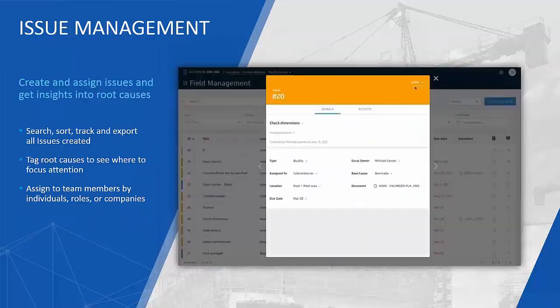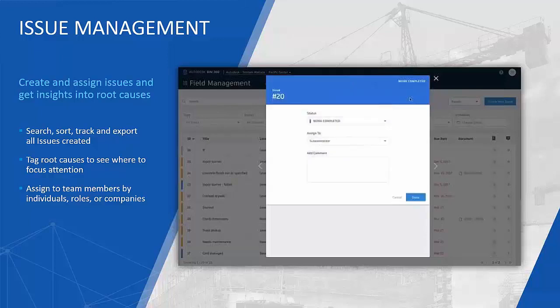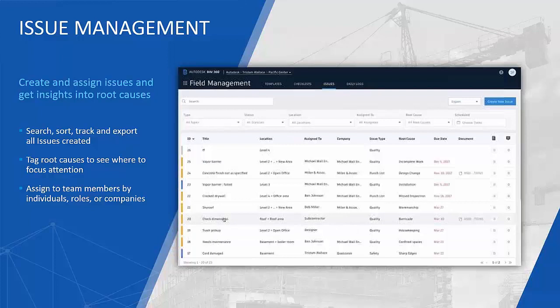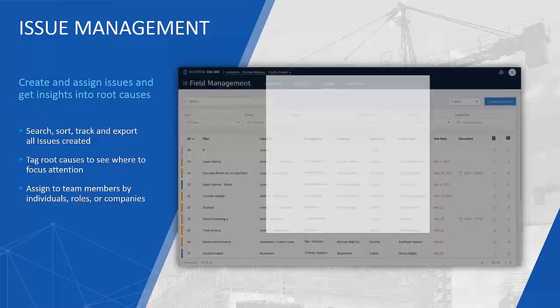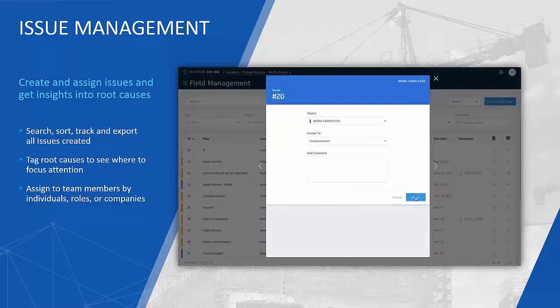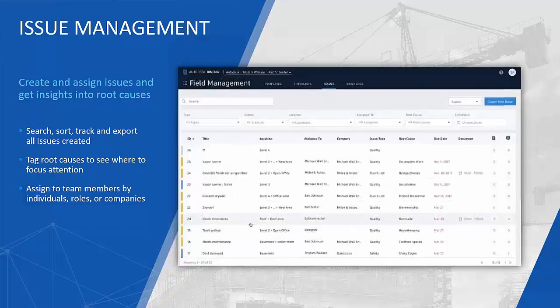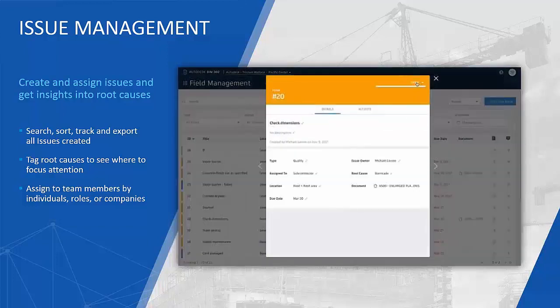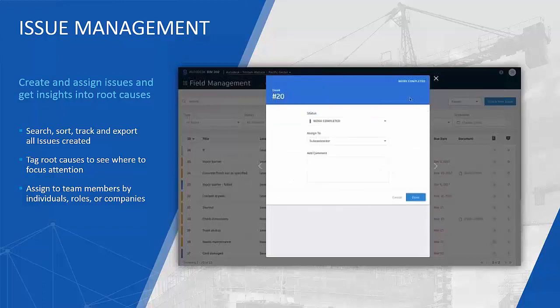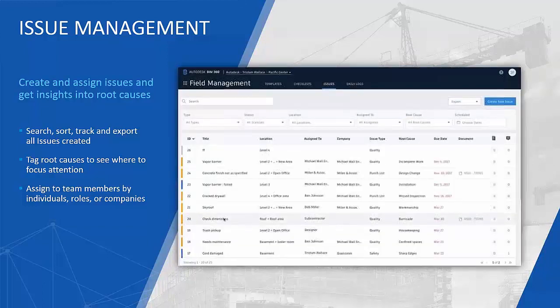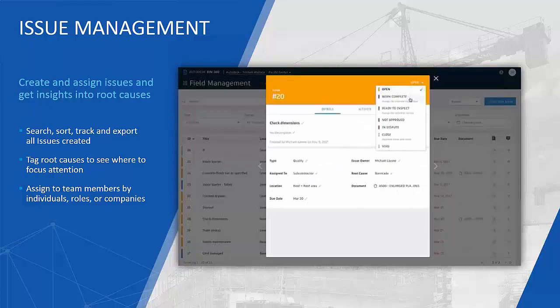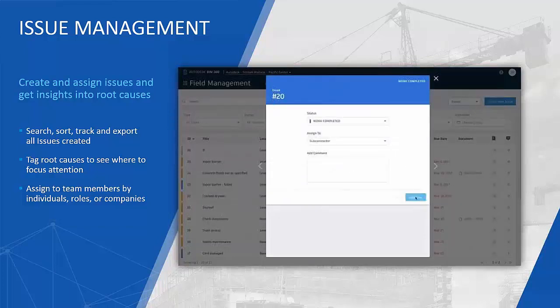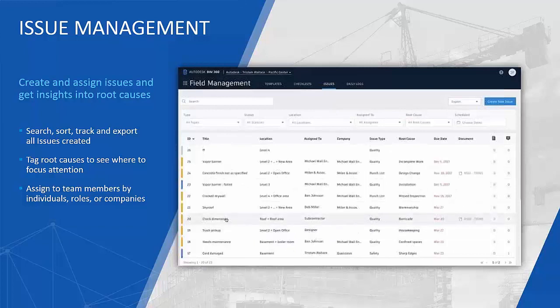And then you can manage any sort of issues that might be created on site, whether it's at a snagging stage or within a checklist. When you're completing a checklist on site, either the architect or engineer or the contractor, on an iPad or a mobile phone, and they come across an issue, they're able to log that, take a photograph of it, and then assign that issue to somebody so that it gets resolved, and that then enables them to close out the checklist.